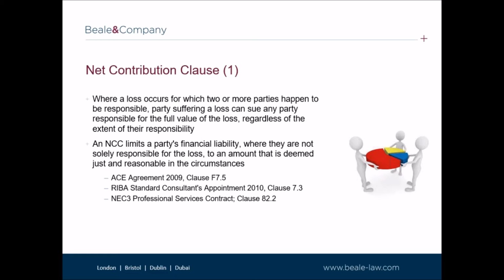So a net contribution clause limits the consultant's liability to an amount that is fair and reasonable, taking into account the party's responsibility to the client for the loss. Net contribution clauses are common in most standard form appointments. As shown on the slide, robust net contribution clauses are included in the ACE agreement and also the REBA consultant's appointment. There's also a net contribution clause in the NEC3 PSC, although as Simi is going to touch upon later, this is brief and perhaps should be amended.